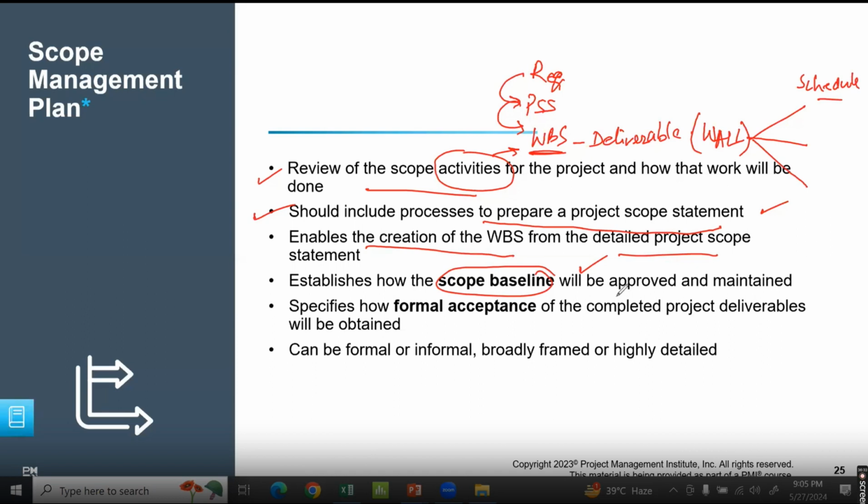Every deliverable that you have there has to have a formal acceptance criteria, a quality checklist, which should say what are the things the customer will come back and check. So my team, the quality control team, will audit the same thing. They will call it a verified deliverable. When they verify, then the customer will check. It will be called an accepted deliverable. So every deliverable that we have will have formal acceptance criteria, which will be used for ensuring that the process is aligned with the customer requirements. So every single deliverable will have acceptance criteria there.